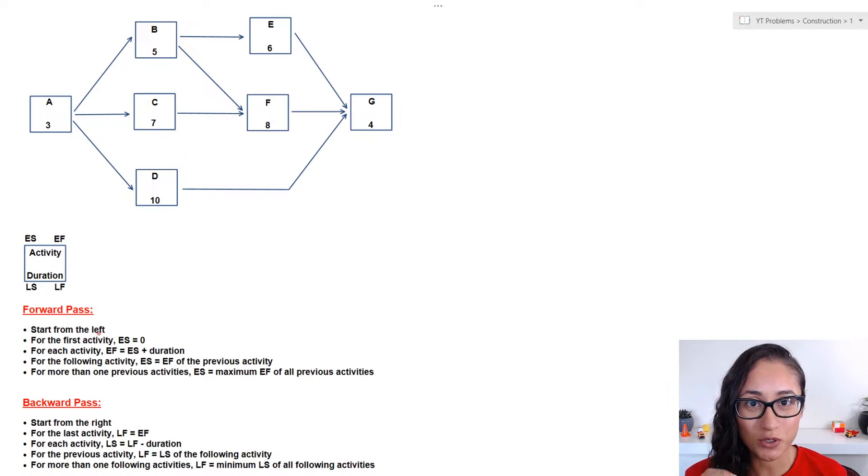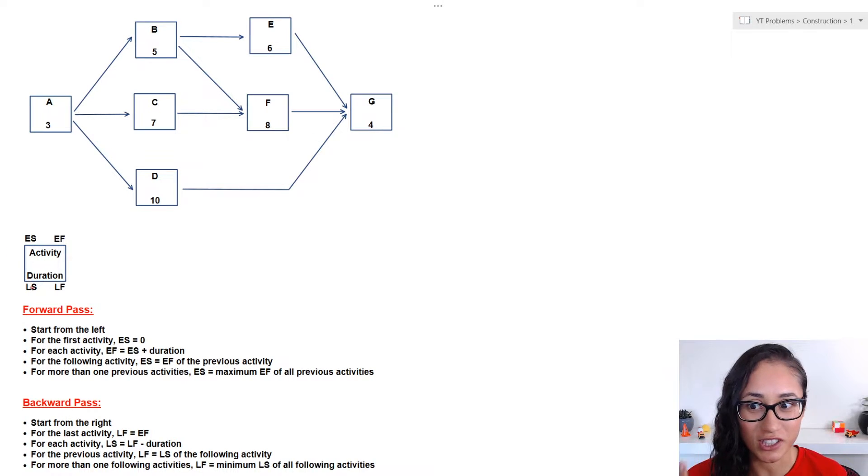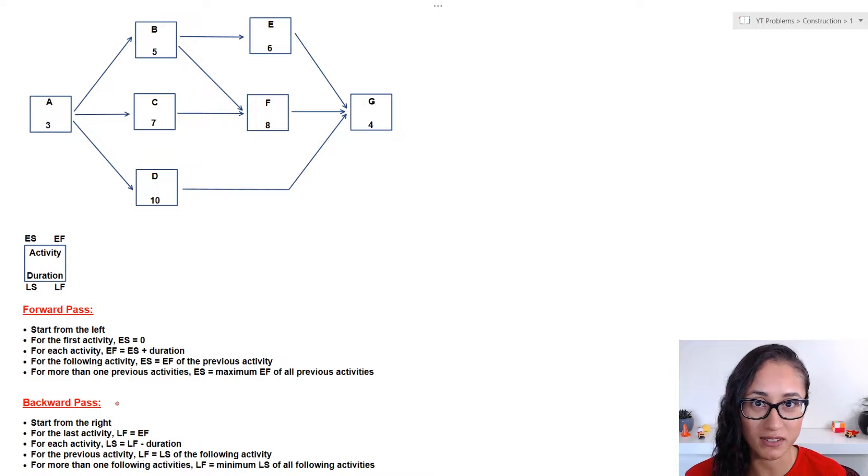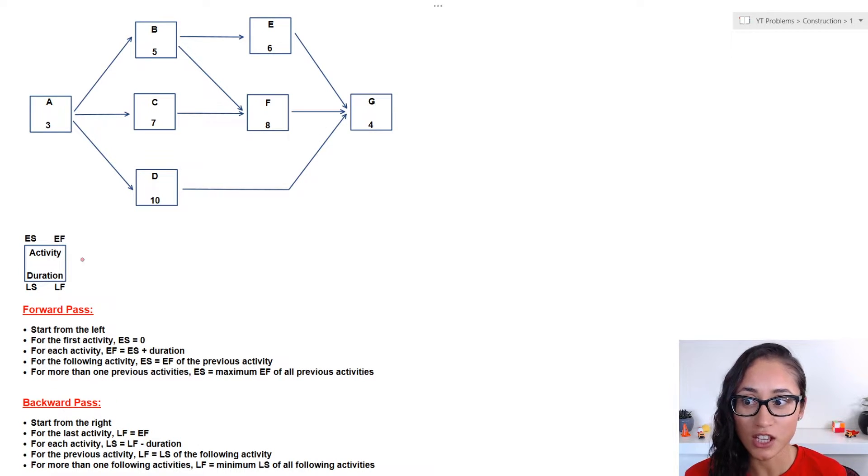Okay guys, so to find the critical path, we first need to find the early start, early finish, late start and late finish. And to do that, we usually use forward pass and backward pass. So, let's start with the forward pass.